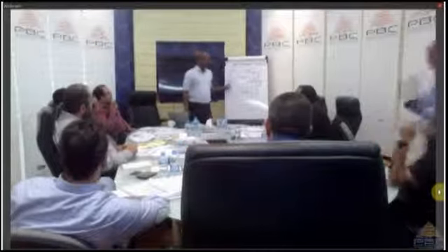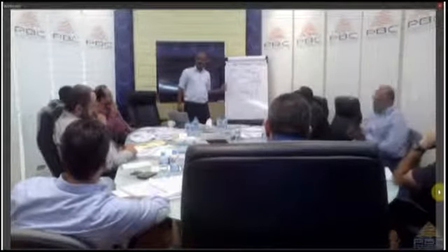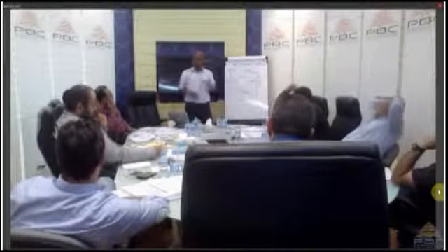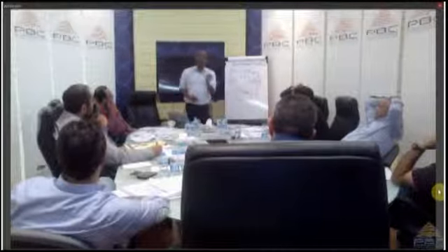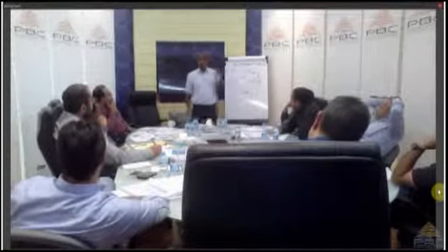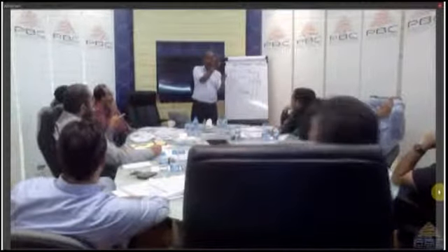So why isn't he assigning the 5K to his initial work? Because his philosophy of assigning cost is based on completed work. So he will not report the 5,000 until he completes the task.